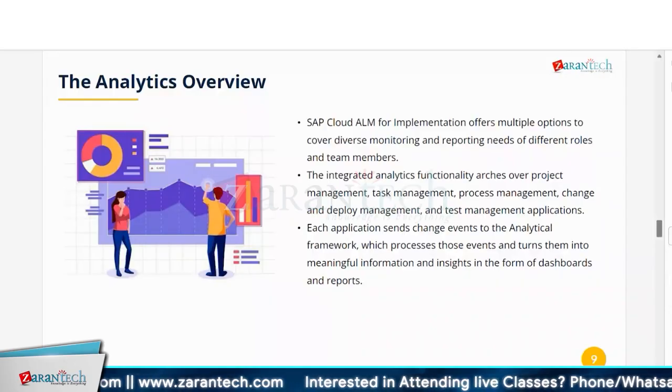You can easily just change the status. One time you just have to upload, and then you just keep changing it to in review, and released. Once it's approved, you can release it, and that's it. And so you have a record about this project, and you can see from the history, right? In every section on the right topmost corner, you have that history icon. So you click on it, and for audit purposes you can see, okay, this was approved, that's why I released it, right? You have an audit for each and every change you do.